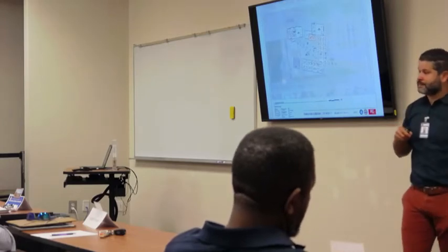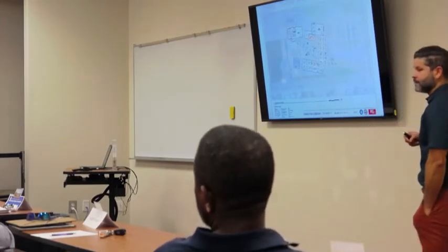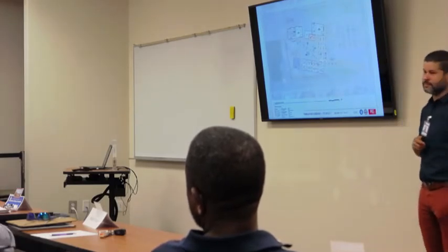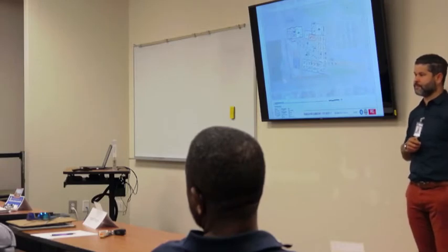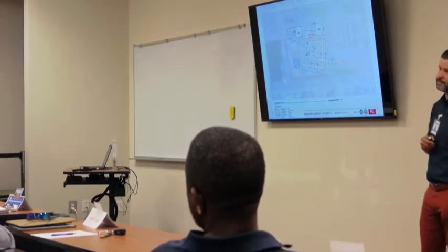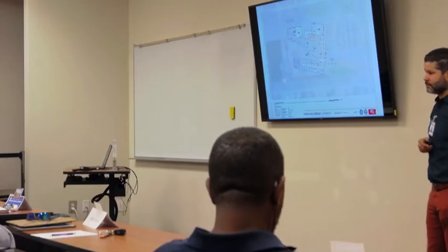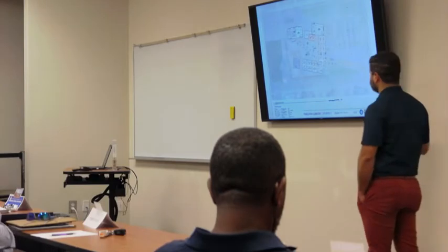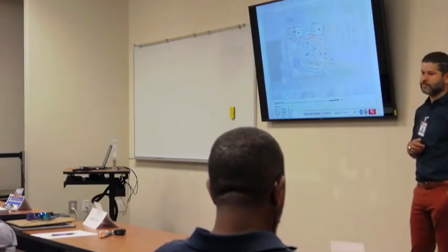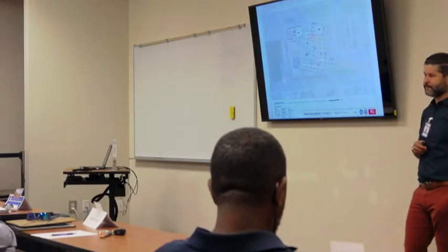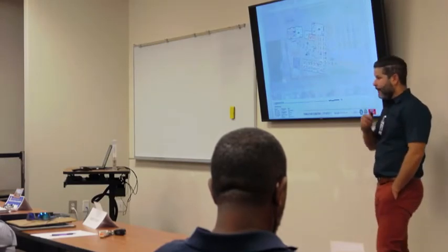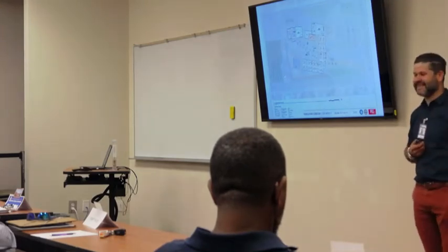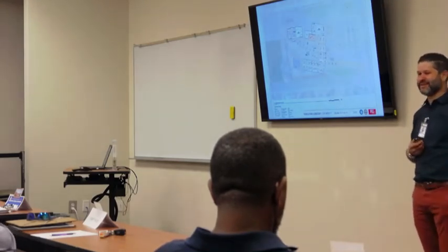Yes, sir. Well, let's jump in. This particular school was Castaldi approved. Castaldi only allows you to replace in kind student seat capacity. That's part of the Castaldi process. So the design has to meet that student population. But he'll show you what options we put in for the potential future growth to be added relatively easily without a whole lot of hard work. I would like to point out that we met with the city and they were adamant that no growth is ever going to happen. They don't even imagine anything going on, and so we don't believe them.